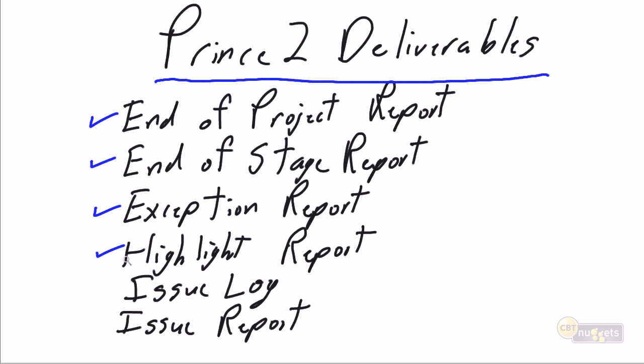The highlight report. We previously looked at the checkpoint report, which I would describe as my weekly status report. The highlight report is a more summarized status report, probably developed on a monthly basis.